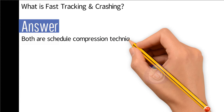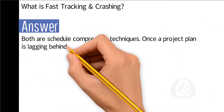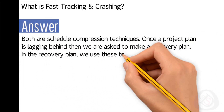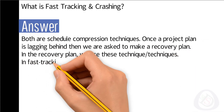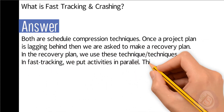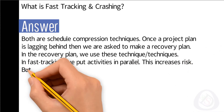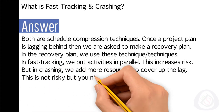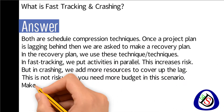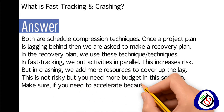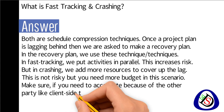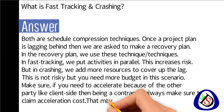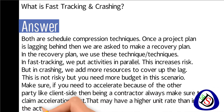Question number 61: What is fast tracking and crashing? Answer: Both are schedule compression techniques used when a project plan is lagging behind and a recovery plan is needed. In fast tracking, activities are put in parallel — this increases risk. In crashing, more resources are added to cover the lag — this is not as risky but requires more budget. If acceleration is due to the client's side, as a contractor always claim acceleration costs, which may have a higher unit rate than in the actual contract.